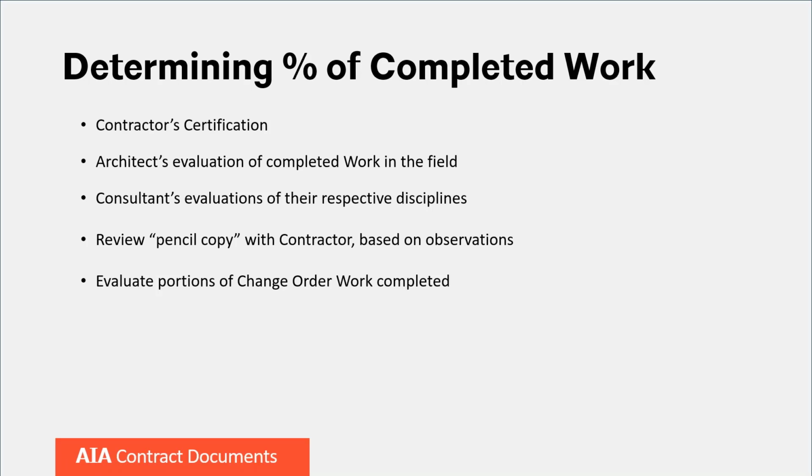And the architect will be making its evaluation of completed work in the field through its on-site observations. And the architect will be verifying if it agrees with the contractor certification, or if there are any discrepancies, making note of that through field reports or other agreed upon documentation.